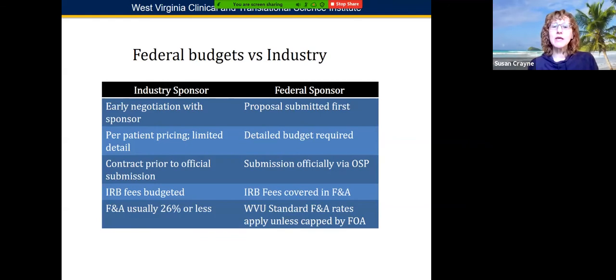So the budget is put together before it's submitted officially to the sponsor through the Office of Sponsored Programs, and your IRB fees would be covered in the F&A costs, which are going to be our standard rates, not the normal 26% or less for industry sponsored, unless the specific announcement that you're applying to has something capped in that announcement.